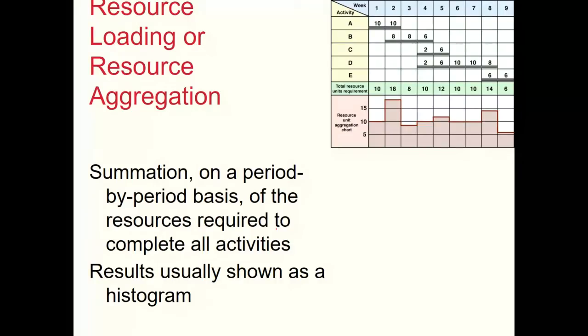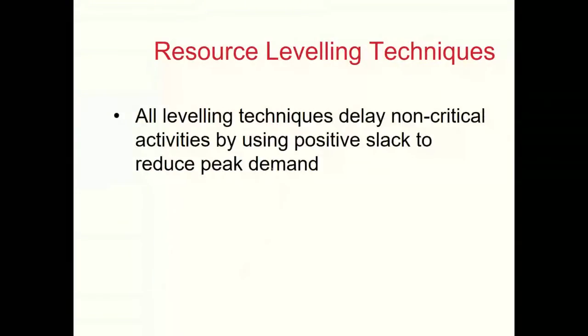But we would like to see what are the algorithms used by the program. So we will be learning to do it manually so that we are more confident in the use of software tools. So when we talk about resource loading or resource aggregation, it's a summation on a period by period basis of the resources required to complete all activities. Results usually shown as a histogram.